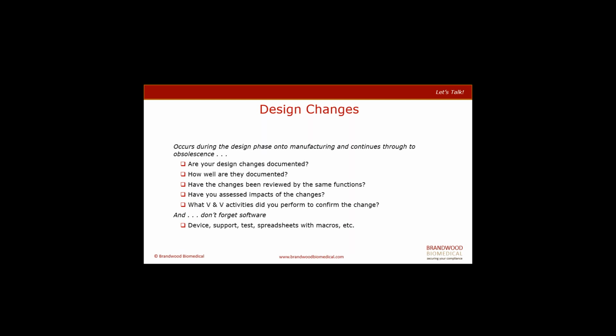But some of the key points when looking at design changes: are your design changes documented? How well have those changes been documented? Have the changes been reviewed by the same functions? Not necessarily by the same individual, but by that function.